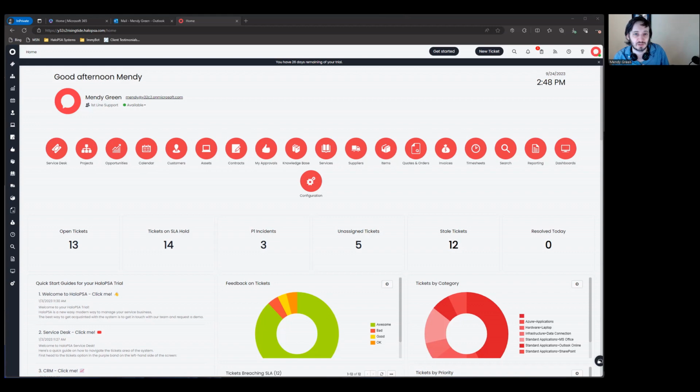Another way to do this is just straight up time and materials. Essentially, it's just time billed. You quote what it's going to be or what it may look like. You don't invoice the labor until the very end, and you invoice for actual time that's spent. So those are the three different types of billing that can occur on a project. And we're going to use the billing plans to formulate and create this complex billing decision in Halo to determine how and when a product is going to get billed.